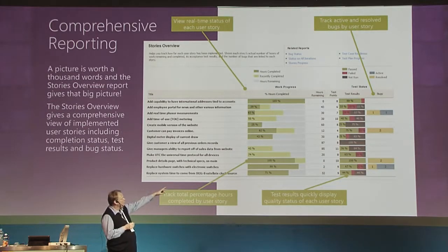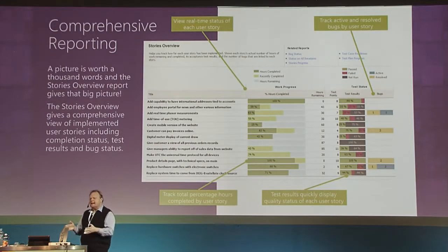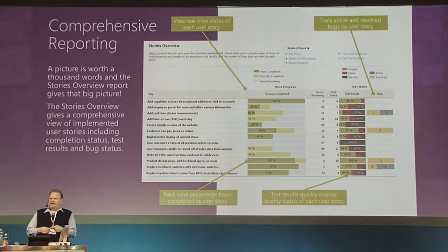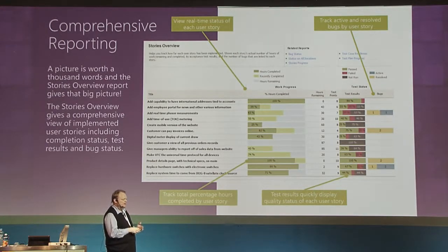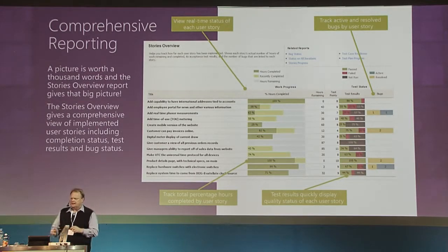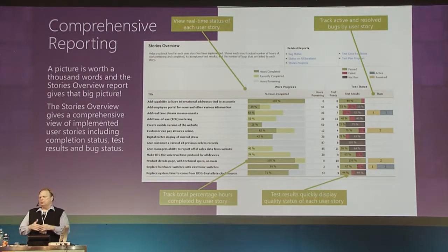A little bit lower, we can see that some features are not completed yet, some user stories are not implemented yet, and we have some open bugs here. So by just taking these 3 pieces of information, requirement, how far along are we in completion, test cases and test results, we can create a report that we can send around to our stakeholders, and we don't need to go to each individual team member and ask them, hey, what are you doing?